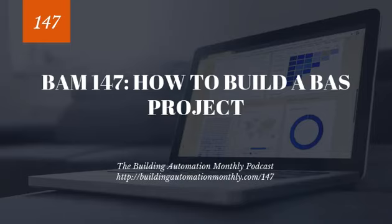Now, the actual step of executing a project is pretty straightforward, and we cover this a lot in our other courses. So the installers will do installation, the designers will do the design, and the programmers will program. Typically, the order is that designers will design, the installers will install, the programmers will program, the installers will then download the program, and then the designers may do some front-end work. That is typically how things tend to work out.